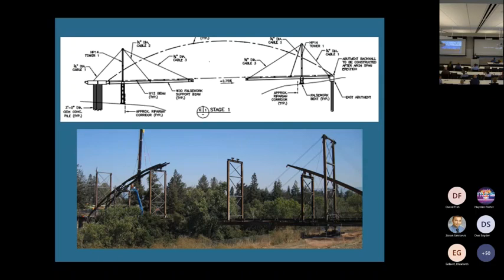Erection here on the one bridge was dead easy because you could get cranes in there. The other span had to be built over, and I can tell you there's not much nature left in this part of San Jose, but this little piece was going from a parking lot to a children's park. They had some endangered species, so we couldn't be in the riparian zone. So this all had to be built in a pretty complicated way.